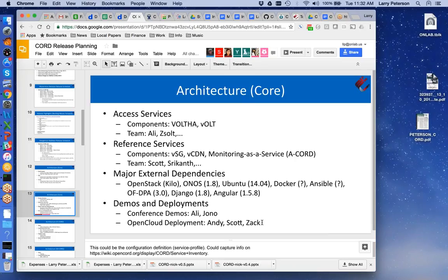Yeah. The problem with upgrading, say, OpenStack or Ubuntu is that as we build the build system, we make a lot of assumptions of the underlying OS. For example, I know that the provisioner container that basically takes a compute node through its lifecycle won't work on Ubuntu 16.04 because the version of MAAS is a new one and the APIs have changed, and the state machine has changed as well.